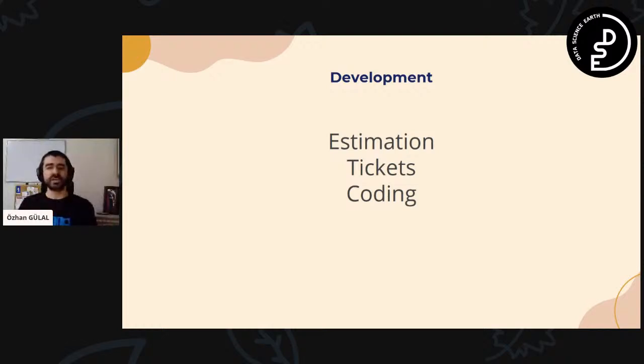At this stage, every company has a different process, but at the same time they are similar to each other. Please don't forget, 20% of every sprint is the testing process. For example, if you have 80 hours of development time, 20% of 80 equals 16. Totally, you need 96 hours to deliver to the customer. This estimation works like that.